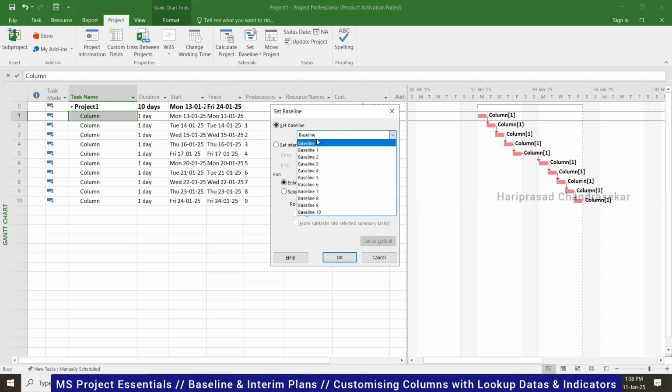So this is restricted. Actually, for a good project, you should avoid multiple baselines. If you keep on changing the duration and cost, then the project will not be successful. Initially you started for $1,000, then again 1,200, again 1,800. You keep on changing the thing and putting in baselines. It's not going to help your project be successful. That's why 11 baselines is more than enough. That's why they restricted it here.